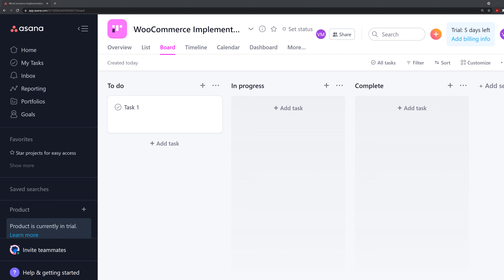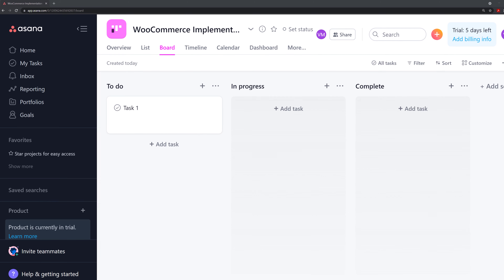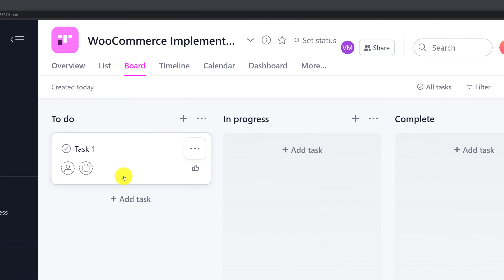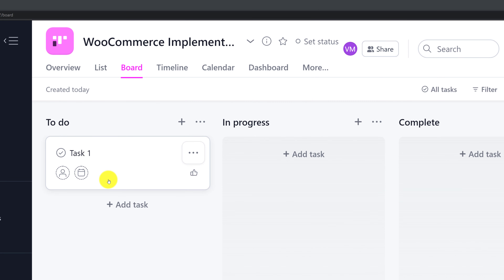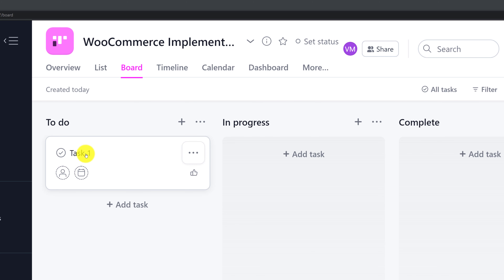Once you set up a new project in the tool, you get to what's called the Kanban view. You might hear different terms for that, but that's ultimately the idea of simplicity. Kanban view works very well if you're just one person or if you have a small team. There are only three columns here: a to-do column, an in-progress column, and a complete column. For every task that you create, you keep all initial tasks in the to-do column. Asana gives you a default task one, and you can add new tasks in each and every section.